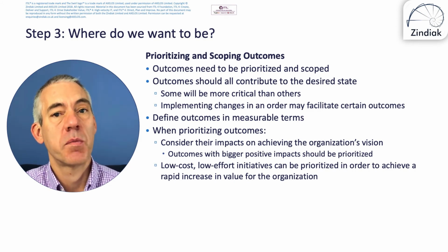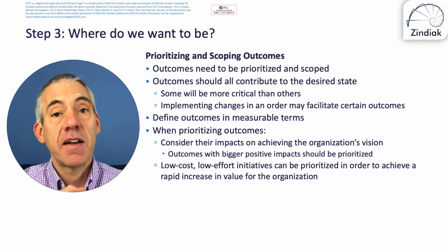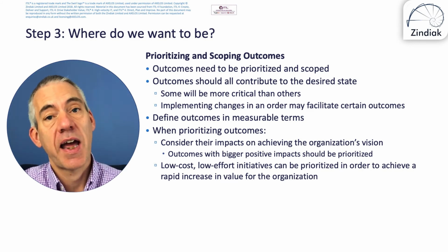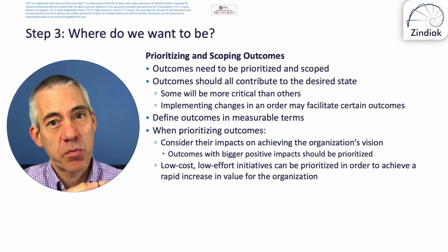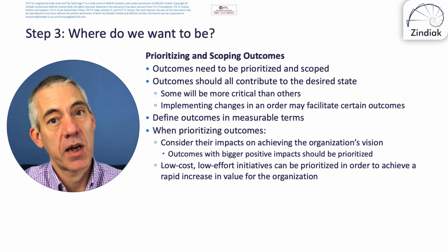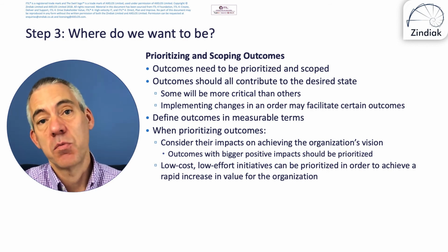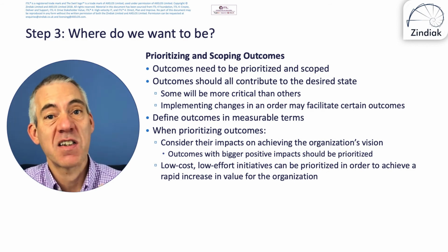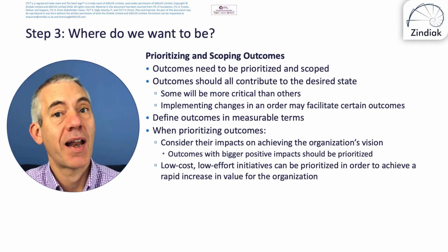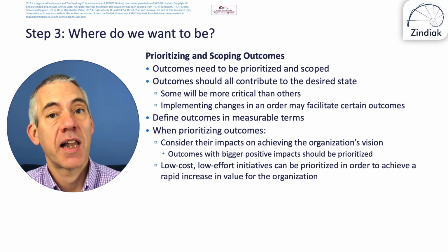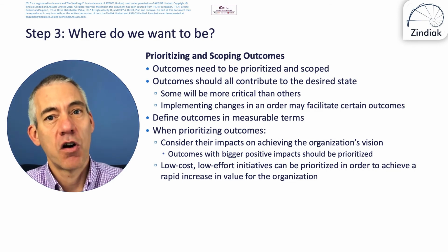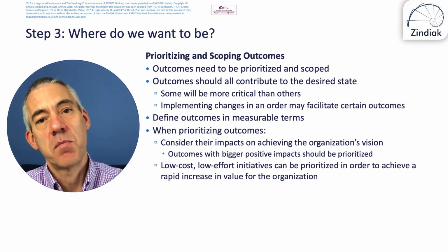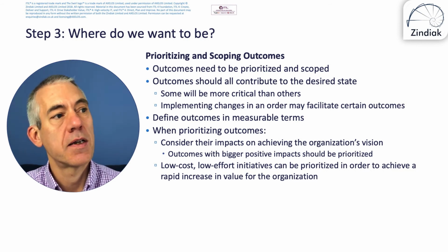So we need to prioritise them, we need to scope them. And again, in terms of scope, breaking down bits of scope. Quite often if you break things down, you might have something that looks like a must-have, but actually only 10 or 20% of it is a must-have. And if you break it down into smaller bits, you get some must-haves, some should-haves, and some could-haves. So again, that's a skill that you develop over time, knowing what level of granularity to break things down to. And we've talked about that in other videos in terms of sagas and user stories and breaking them down into smaller bits.